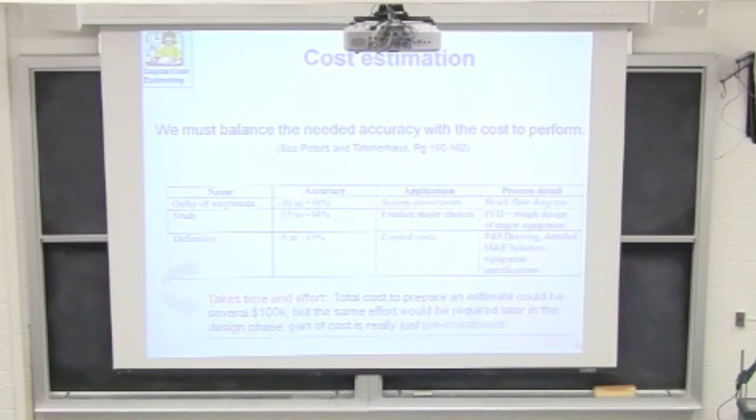You could see this in practice as maybe you're going to use a technology that's from BASF, or maybe it's a technology from BASF's competitor. Right, so screening between those two alternatives, which type of flow sheet are you going to go with? Once you've made that decision, you start looking at the major pieces of equipment and adding those in. And then when we want to get to a definitive estimate, we really want a closer accuracy to the final value, and we've got a very detailed drawing there for that.